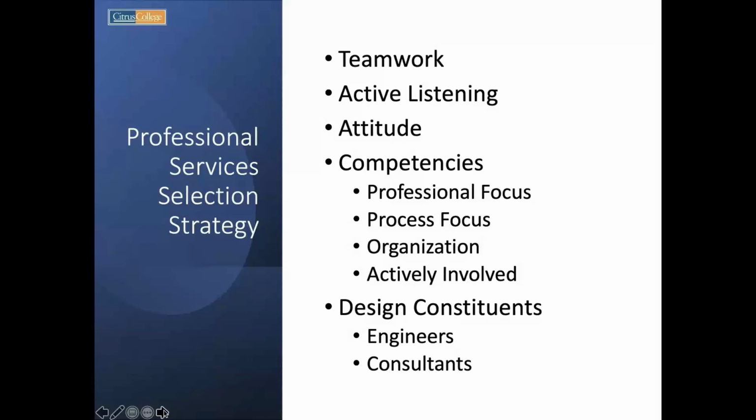If you go on DSA's website, because that is our authority having jurisdiction, you can type up any district in California, whether it's a community college or a K-12 district. Go on there and you can see how many projects have not been closed out. Especially on the K-12 side, there's thousands. Our district right now has like 2 that haven't been closed out, and those are open projects.